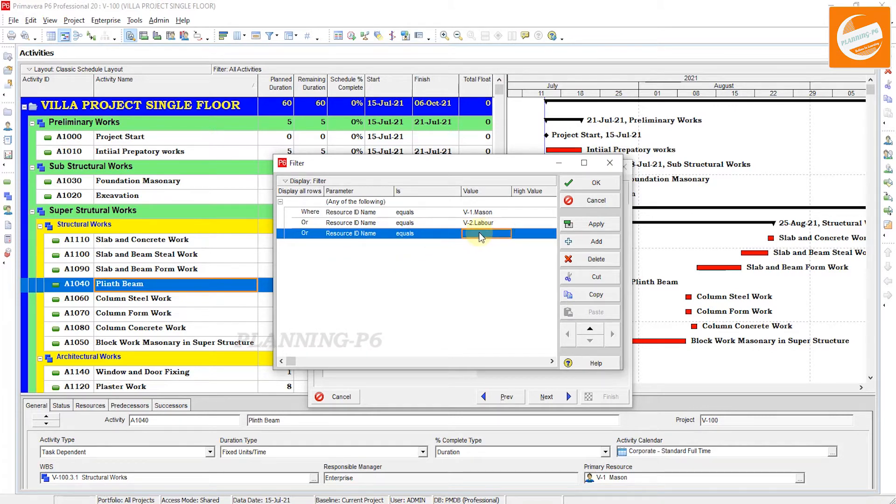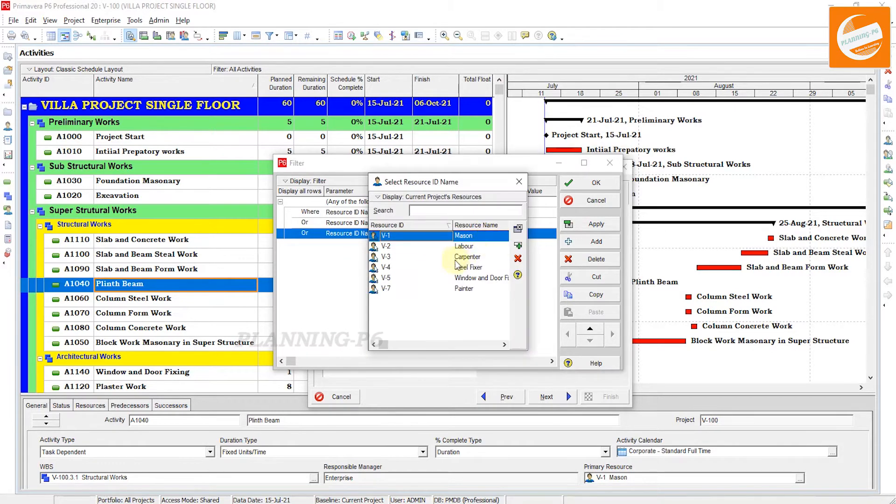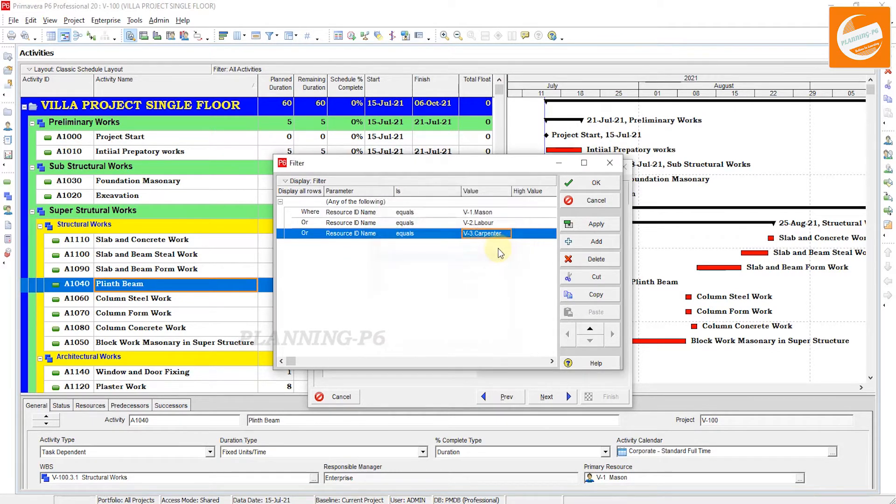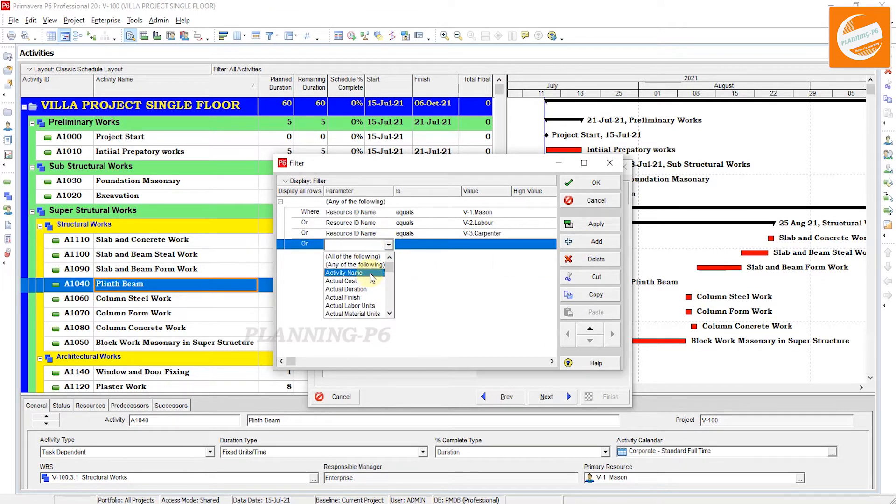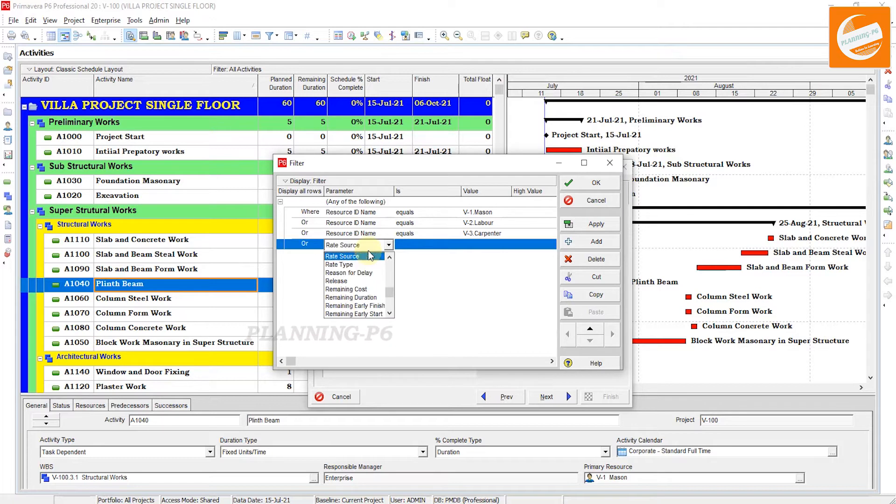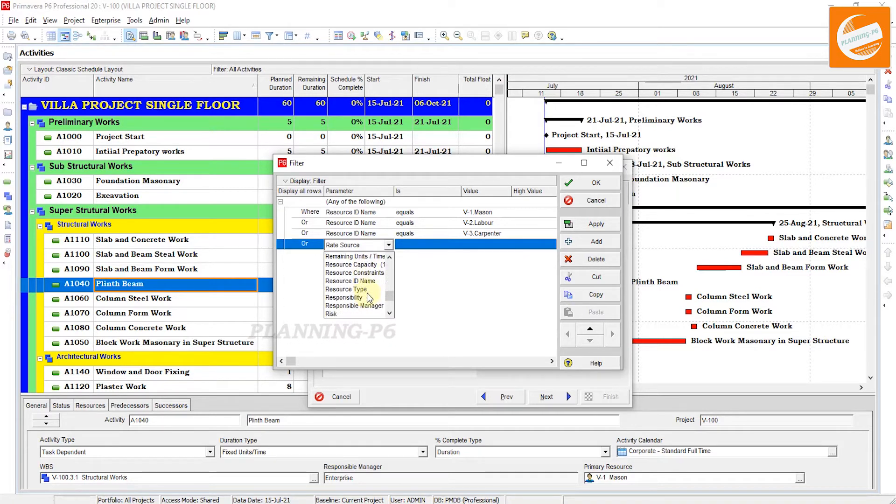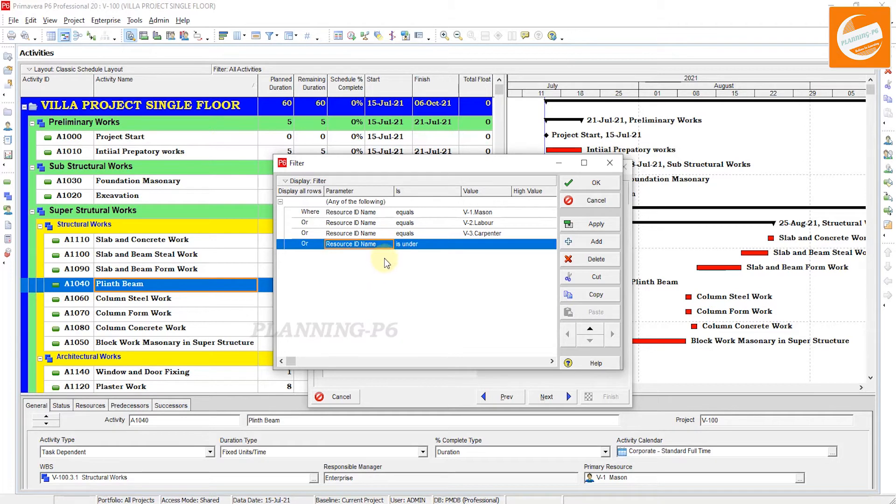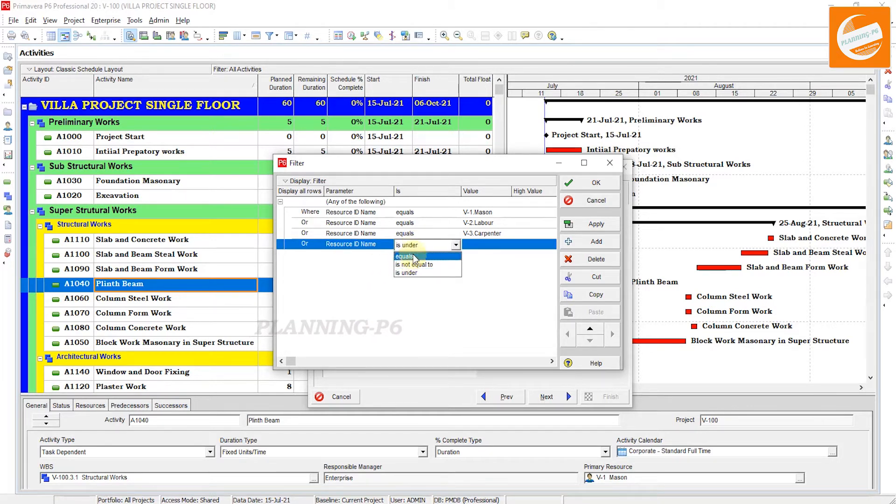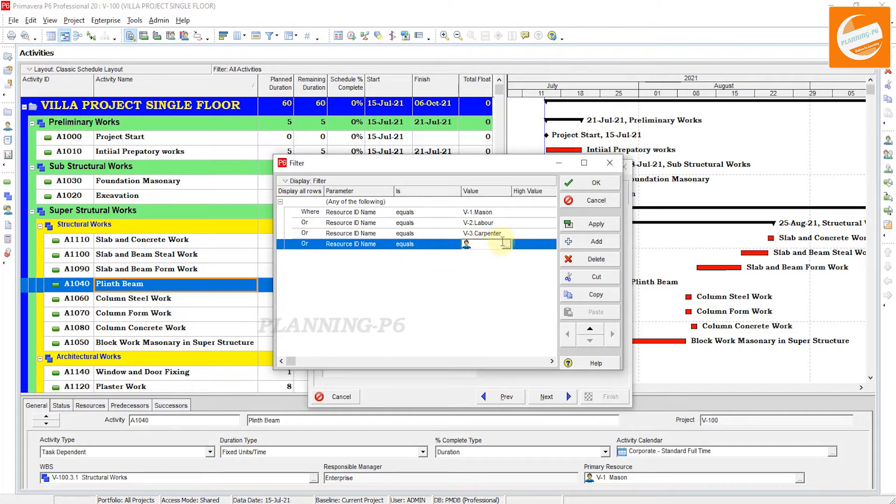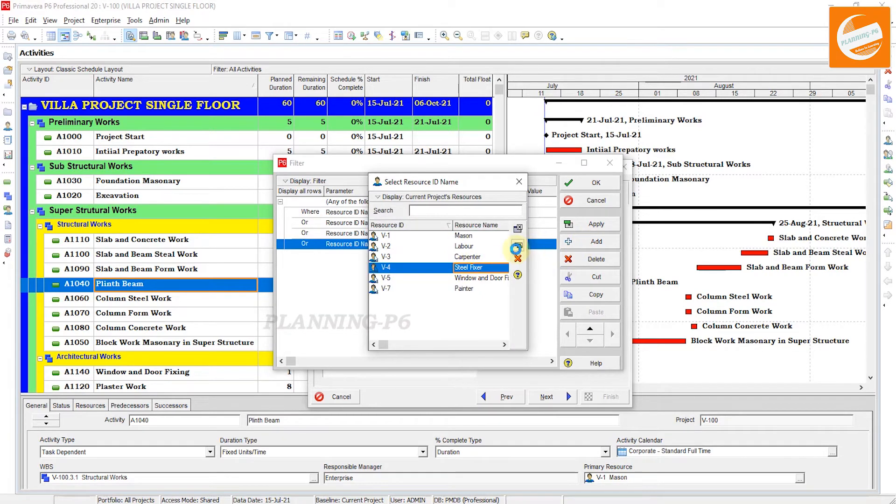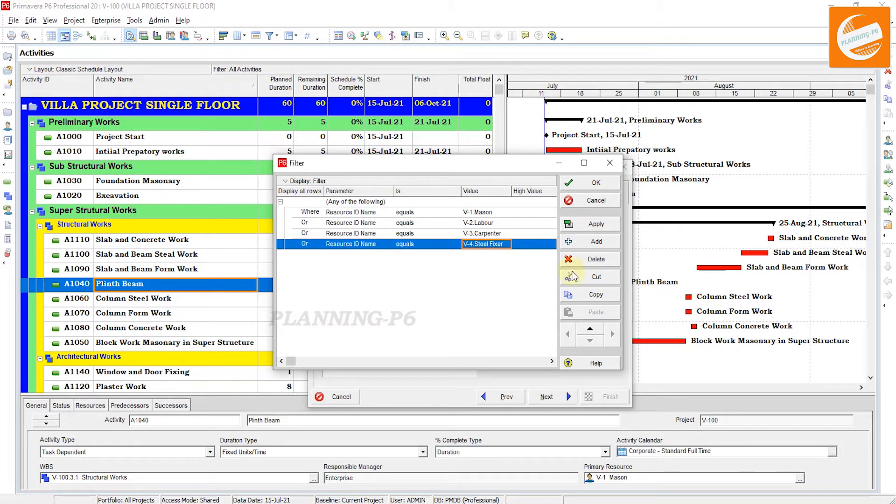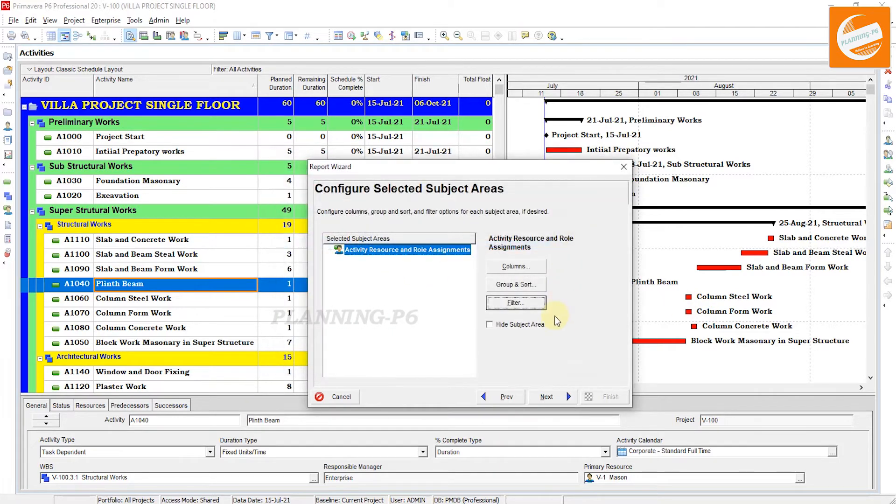If you have created one resource for the manhours which we are giving the name Manhours and you put all the manhours calculated and you are not assigning too many resources for the manhours, then you have to put 'is equal to' Manhours. Then it will be easy to extract this sheet. Otherwise, you have to add all resources here in the filters.